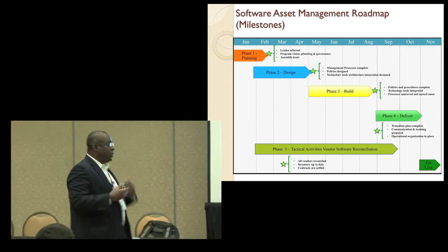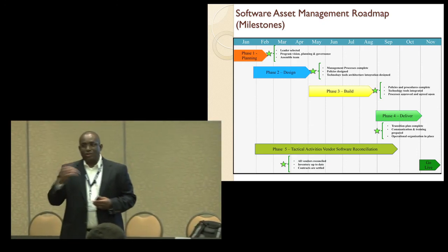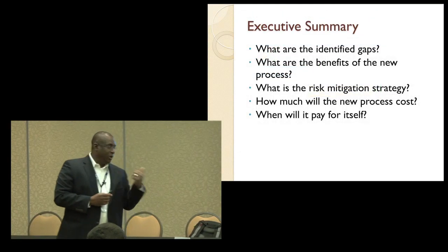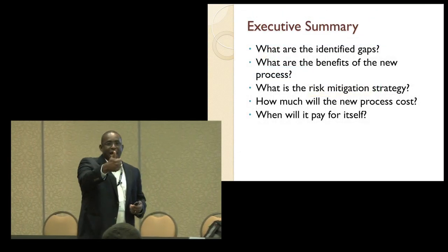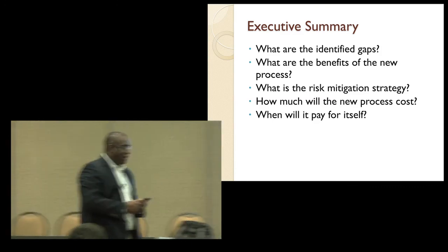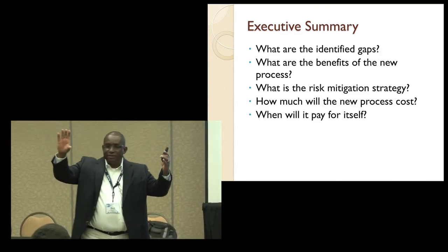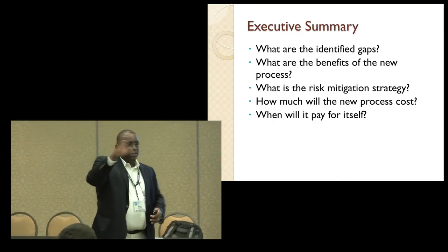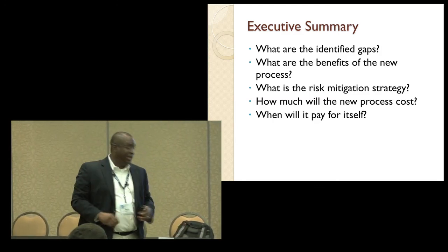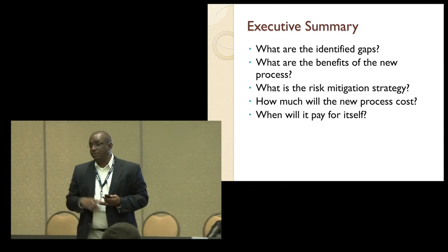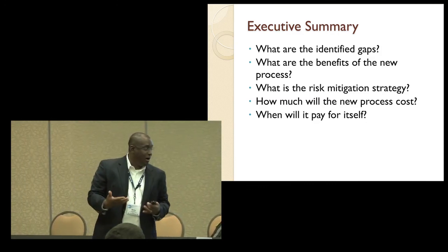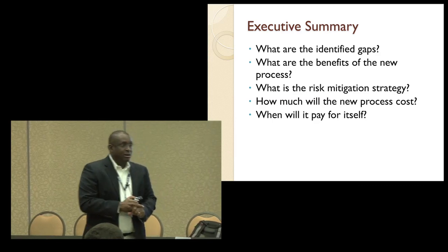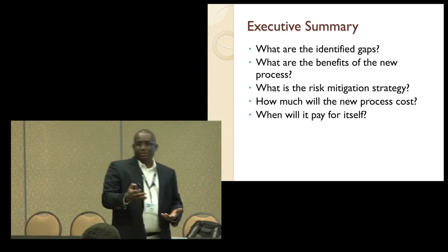Now, when you get to the end of your strategize phase, you want to build an executive summary. You want to know, hey, what are the gaps? We know what the gaps are because I had a gap analysis. I told you exactly what the impacts are, how long it will take, who's impacted by it, how we plan to remediate that process, what the benefits of the new processes are, what it costs, how we're going to manage risk, and when it will pay for itself.